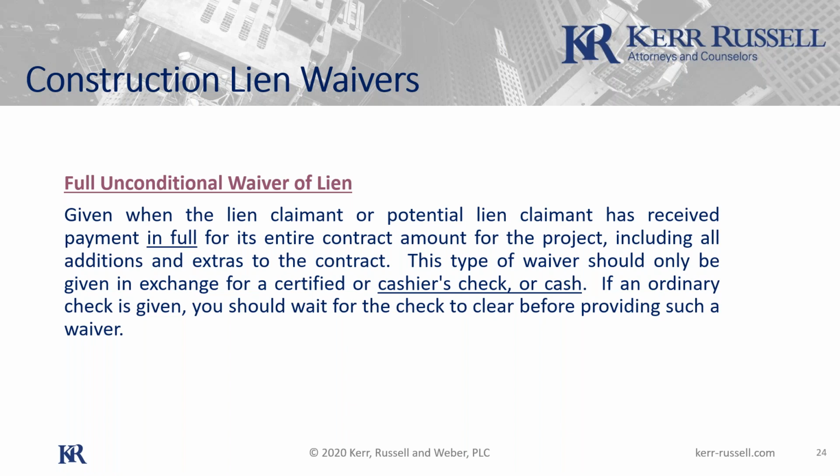Now, a lot of times if there's a dispute, we'll get it resolved, and then the general or the owner will say to my client, all right, give me a full unconditional waiver. And so the advice is kind of underlined here for you guys, and you may already be on top of this: you wouldn't want to give them that full unconditional waiver until you have money that cleared the bank. So a cashier's check, that's almost infallible. That would be fine. I usually have to tell my clients, you can't really give them a full unconditional until the money that paid you has had a chance to clear the bank. So once in a while, clients will override that recommendation if they trust the person they're dealing with. But certainly that's always my advice.